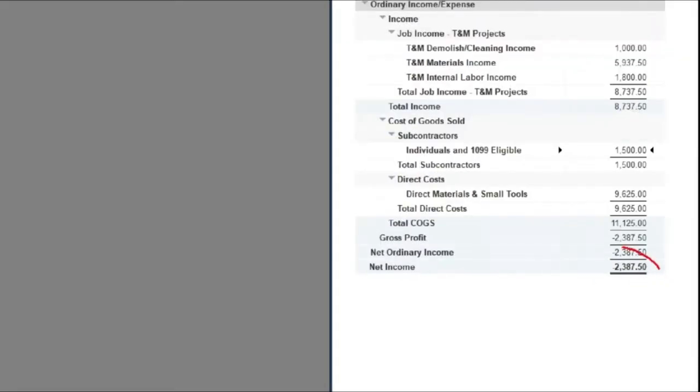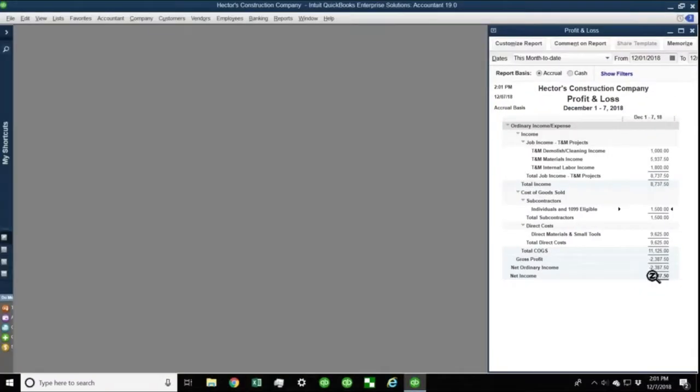and we have all the material purchased and some of the labor spent, currently I have a profit and loss statement telling me that I'm losing money. The problem is that that's not really accurate because I haven't invoiced the whole job, and I also haven't brought in the entire expenditures, which is why I don't think cash basis or straight accrual basis is a good basis for construction. You want to use either completed contract method or you want to use the percentage of completion.